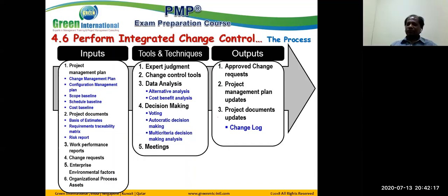Otherwise, for example, what happens in this situation? We are working based on revision 3 of the project management plan. Whereas, when you look at the changes proposed, why are we having this change? Because our team wrongly implemented based on the revision 2 plan, which created this change. If the revision control is not appropriately managed, it is going to cause problems to the product deliverables.